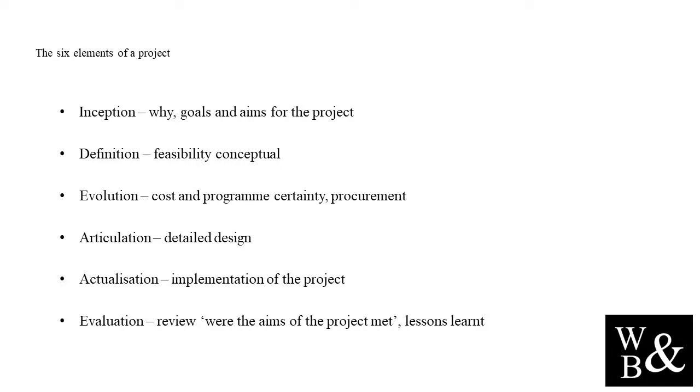Continue to progress the risk, assumptions, and decision registers, aiming to close out any residual risks and assumptions, and therefore reduce the project risks. Refine the whole project budget and assign budgets to any residual risks. From this, you and the project team will need to secure project funding. In this element, the project team may look at procurement strategies if the preceding project elements need to be let out to specialist consultants and/or contractors.